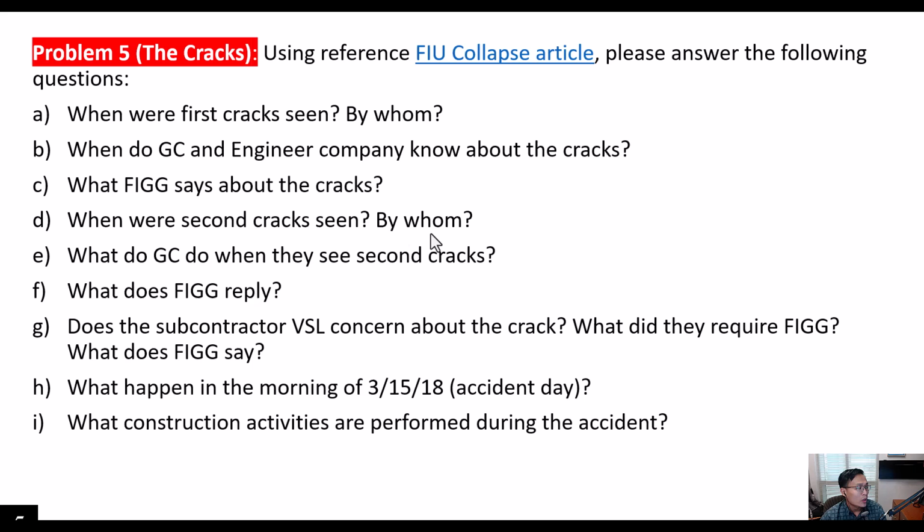bridge. However, this one is a design-build delivery method, which means that MCM is the one that takes all responsibility. A better action by MCM is that they could pause the project, and then they could ask for a third party to do some analysis or some calculation before they resume the construction. However, they didn't do that. They just relied mainly on the analysis of FIC, and FIC made an error, and then the project collapsed.